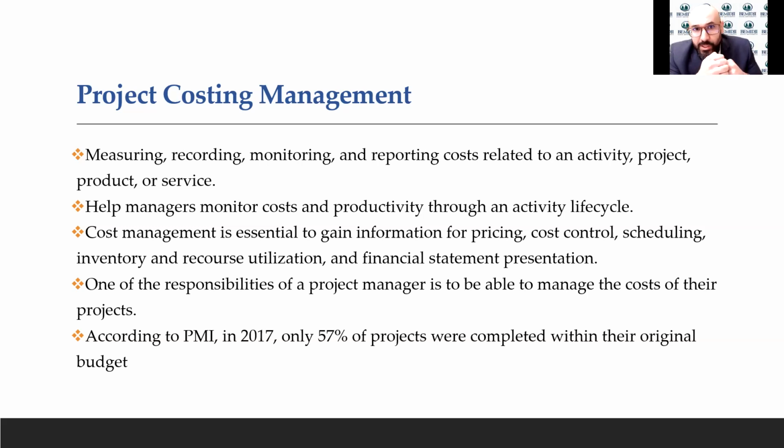Cost management is essential to gain information for pricing. One of the things that we need to do as operations managers and project managers is to put a price on a product or service that we provide. In order to do the pricing, we need to monitor the cost for this activity or project. Based on the expenses that we pay and the profit margin we would like to make, we can set the price.